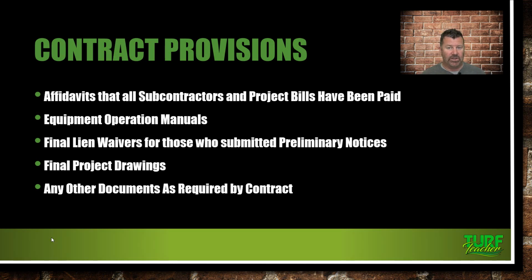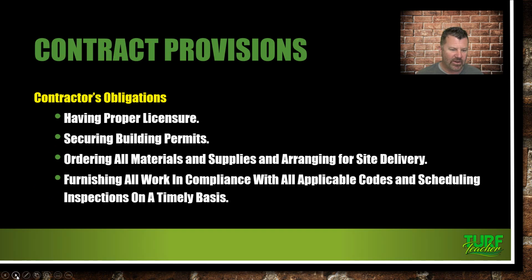Now, we've actually had to take lien waivers ourselves to our suppliers and have them sign it saying that they have been paid. And guess what? They required us to pay them before they would do it. As the landscape contractor, we're kind of stuck in the middle sometimes. Everybody else is getting paid but us. And unfortunately, when it comes to the progress of a construction site, we're the last ones on site. Therefore, we're going to be the last ones to get paid. I wish we had as much authority as the concrete company that delivers the concrete, because they are the first ones that can put a lien on a property.